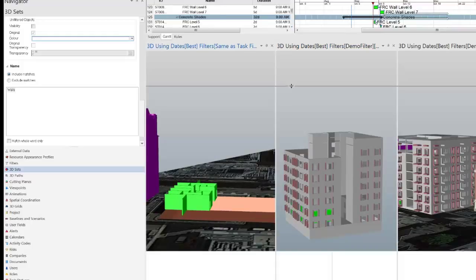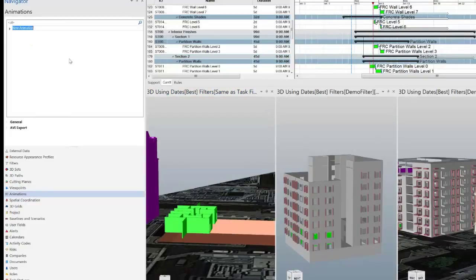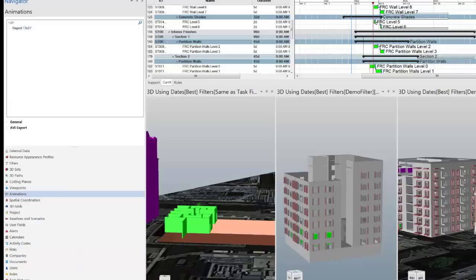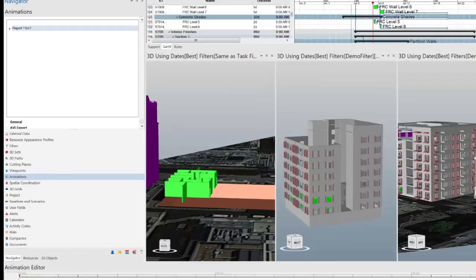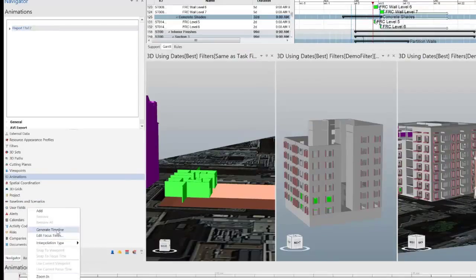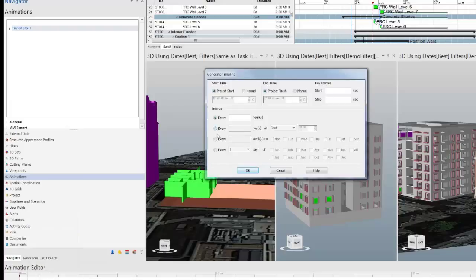Now let's start creating the animation. I'm going to create the animation and call it 'Report 11 by 17.' For this report you want to generate a timeline, so I'll bring up the animation editor. If you right-click and select 'Generate Timeline,' you can set it to step every week. I'm going to start at zero seconds, step at one second, and start the report on Monday. Hit OK.